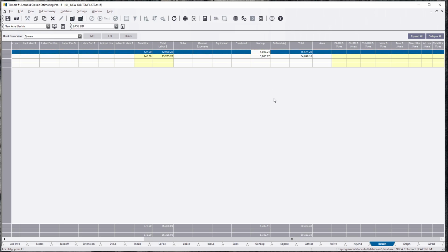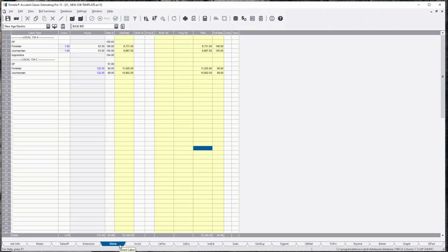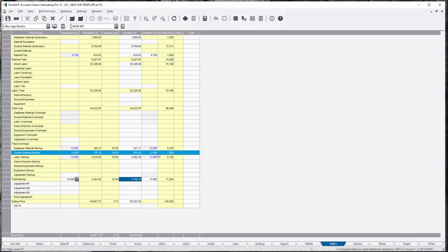So I might do another video talking about giving back money and alternates and deducts and stuff like that, because if you truly think about this, just remember that when you're giving back stuff, when you're doing base bid and just breakouts and actually not separating it like an alternate, you have to understand that when you do give stuff back, it's going to be what you put here.